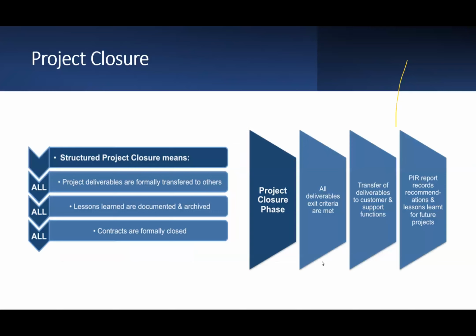Another area where we practice very poorly is the closing of projects. Usually when the members of the team sense that the project is about to end, they just take off and go to the next project or their other operational activities. We don't close the accounts of the project. We don't close the activities with our contractors. We don't do any audits. We don't do any filing of documentation and so on. Even when it comes to transferring the deliverables to the customer, we don't do it formally.